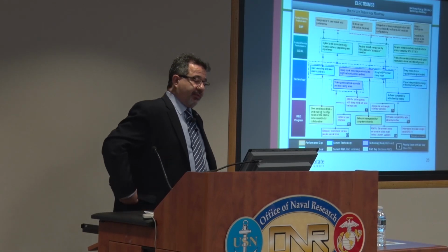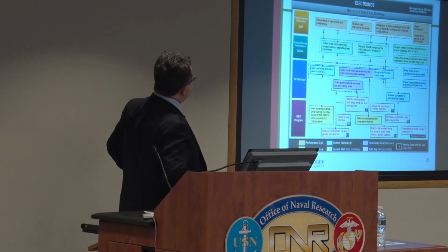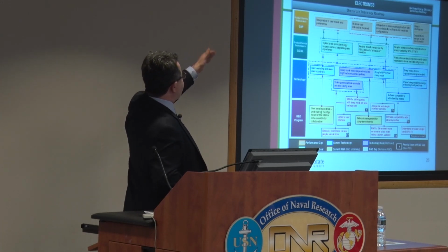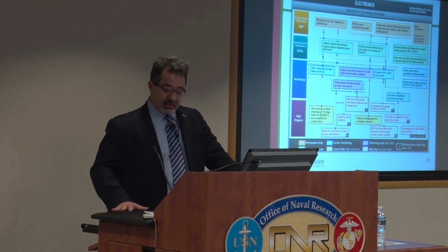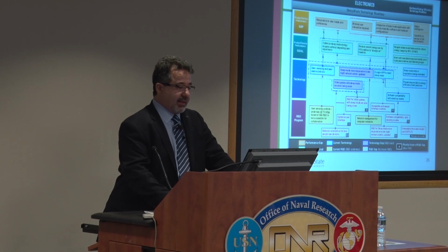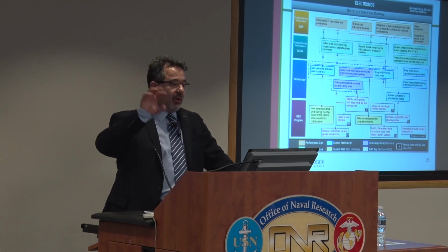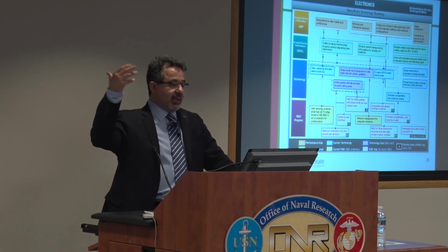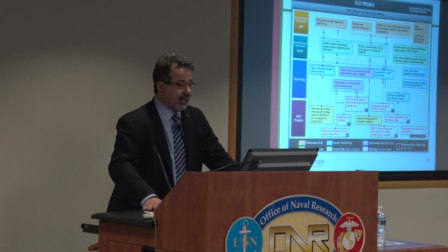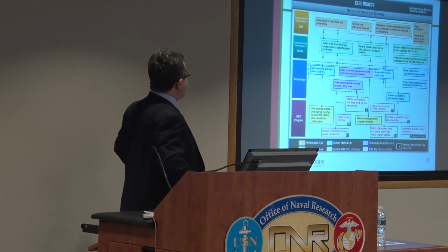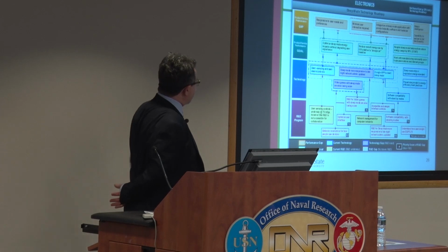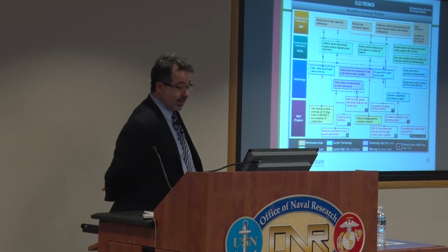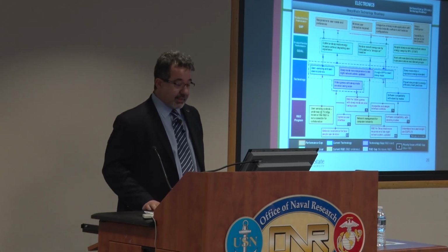Now, this is one of the, I think, 95 roadmaps that came out of it, so the product service area and the specific technology. The format we had here, we focus on the gap and the goal to be met so that the gap can be closed, and technologies needed. The pink ones are not available, the blue ones are available, and then the programs that are going, in yellow, the R&D programs, and then the white are the R&D programs that are needed.